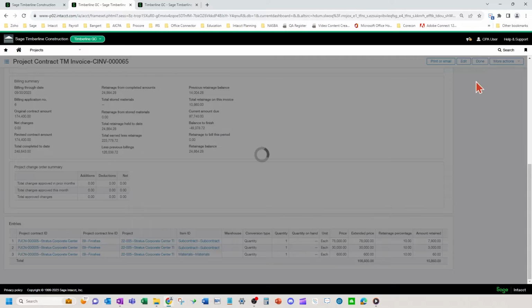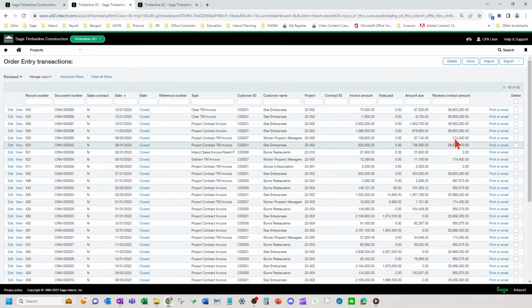Okay, so time and material, if you delete, does restore whatever costs you had on that specific invoice to the customer. Now let's say that you have sent this to the customer, they have paid it, and then later you need to give them a credit for one of the costs on that invoice.